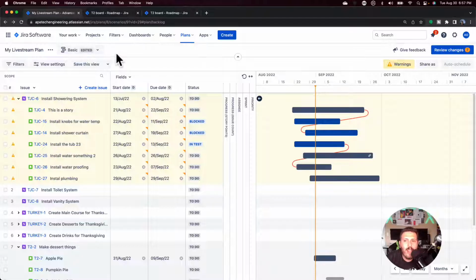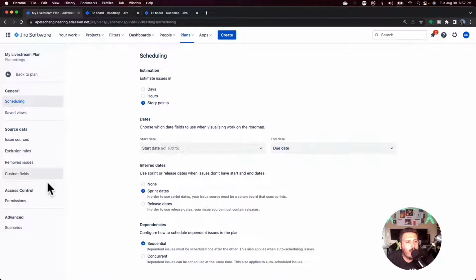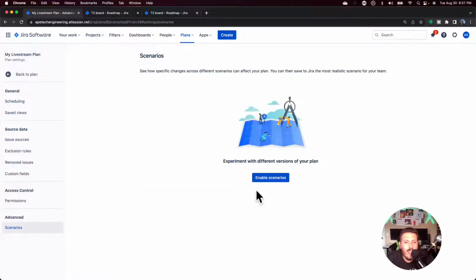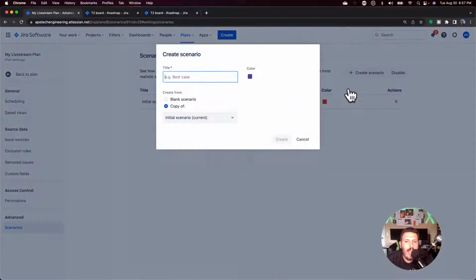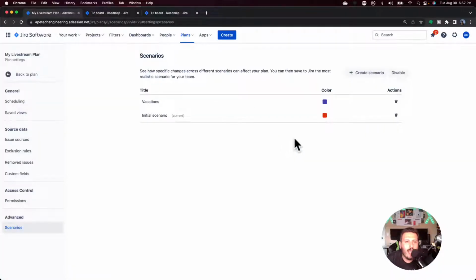And so I just want to show you a couple cool things here before we leave, but we won't go into any specific details because we're running out of time for this live stream. One of the things that you saw in configure is this thing called scenarios. What you can do with scenarios is actually kind of cool, right? We can leave the initial scenario to be the main one, and then I can add another scenario to be like vacations or something. It'll just be a copy, and I can hit create.